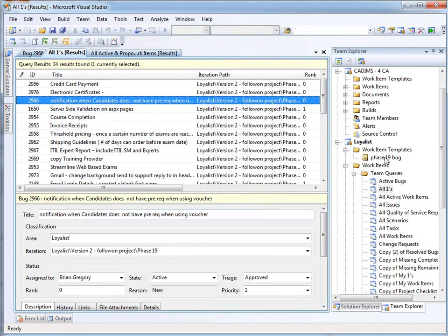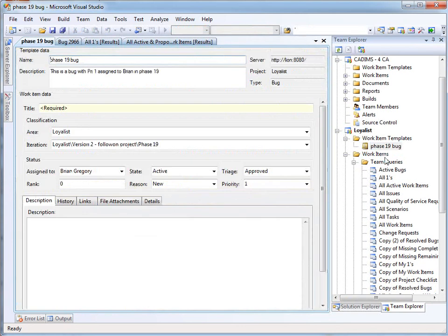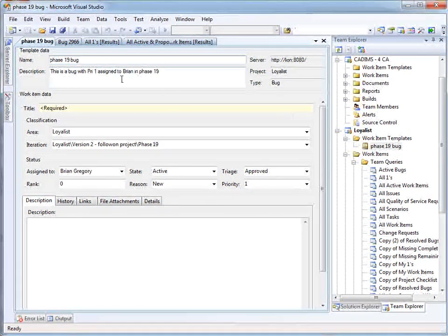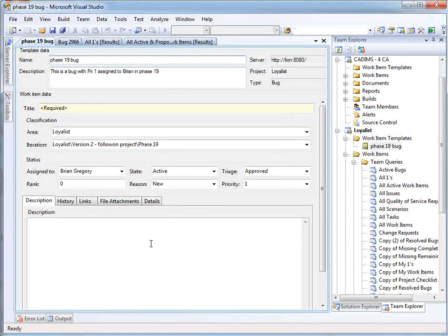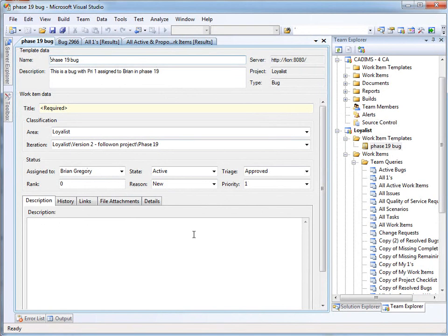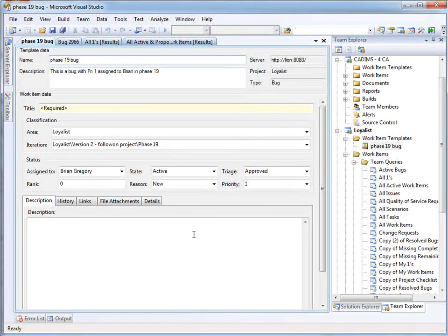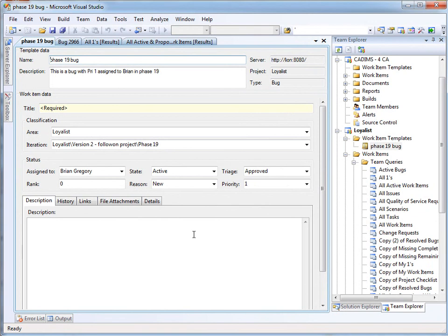Now you see there's a template here under work item templates, and when I double click it, this is just telling me about the template. This isn't the description for the bug. I still have to fill the bug in in the usual way, but all these other things are filled in the way I like them. So it's just a lot quicker if I'm a tester or a manager and I'm running through assigning a whole pile of work items at once. I don't have to be clicking in drop-downs over and over again. I can say, look, everything I'm adding right now is going to be in phase 19. Everything I'm adding right now is going to be assigned to Brian. And then I can go in maybe assigning another batch to another bunch of people or for another phase. It's a very small change in the way that you think, but it removes some of your frustrations and lets you simply focus on typing what you want to type.